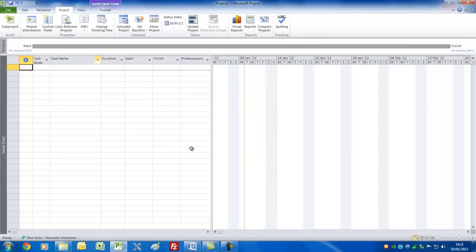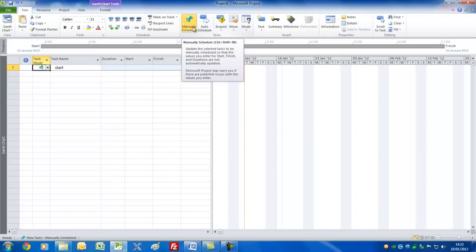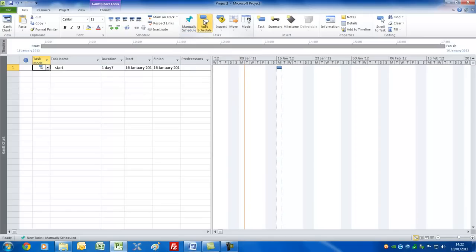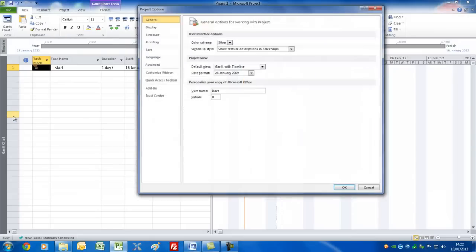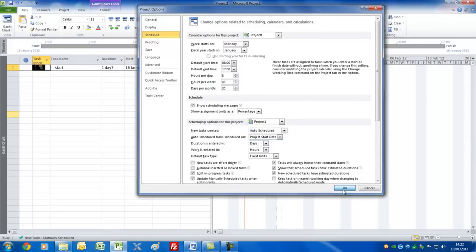The next thing is to set up the tasks themselves. If we go into Task Name here and type 'Start', that'll be my first milestone. You can enter it by clicking another cell, or by using the Return key or Arrow keys on the keyboard. Notice we've got something called a Task Mode here — we're using manually scheduled tasks, which I don't think is a good idea. It's asking you to go and schedule where tasks should start. I believe you should set Auto Schedule. Going back to File Options and Schedule, it's a good idea to set this to Auto Schedule so that that will occur from here on in.